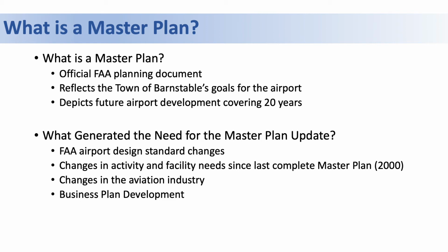Typically, an airport master plan update is necessary to identify any changes in airport design standards, to respond to changes in activity and facility needs since the last plan was completed, to look at changes in the aviation industry and to identify any changes that the airport may have to make to meet those industry changes, and to look at the airport business plan and to help the airport with development of that plan.